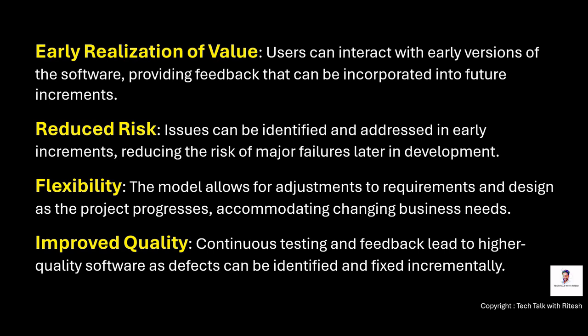Otherwise, if we build the whole product at once and the client sees it and says, oh no, this is not what we were looking for, then the whole time, investment, and money just went in vain. So it is reducing risk, because in incremental delivery we first phase out the major requirements, deliver them, and get the feedback. So again the risk is reduced.